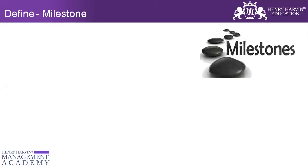For example, if you're starting a project on the 1st of July, the 1st to the 15th should be Define. The 16th to maybe the first week of August should be Measure. You should give at least three weeks for the Analyze phase, because you need to do a lot of tests, a lot of studies, to get to the root cause.